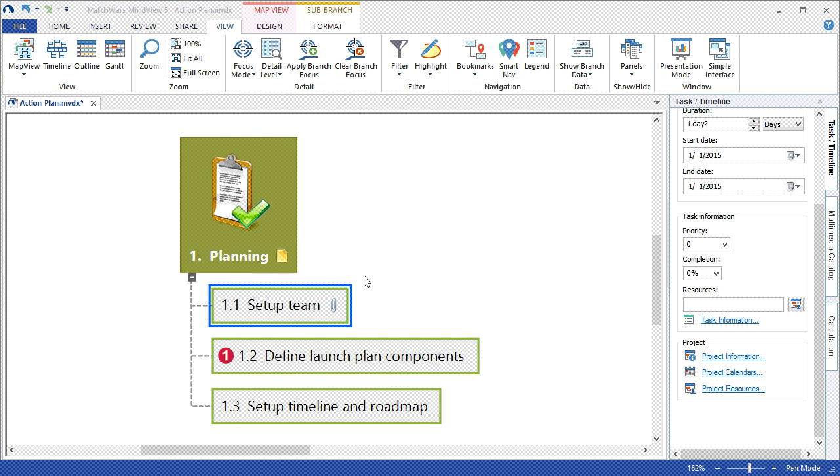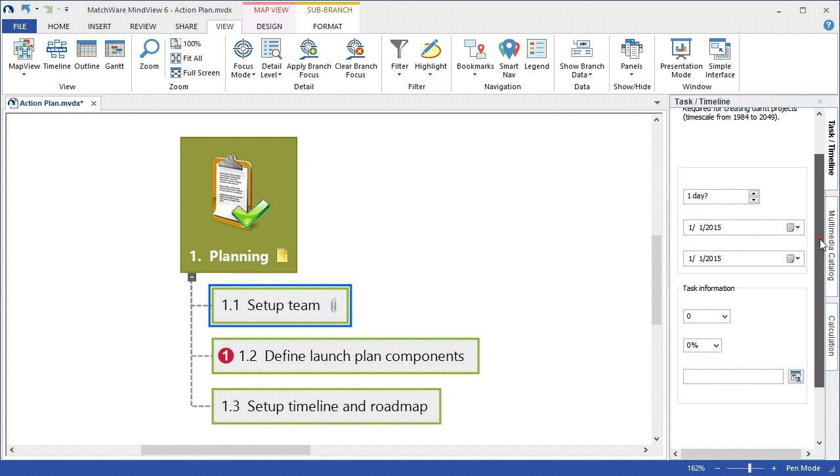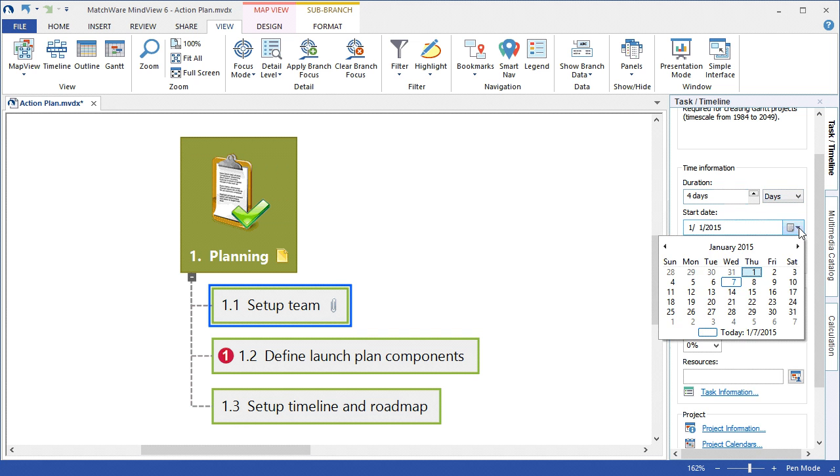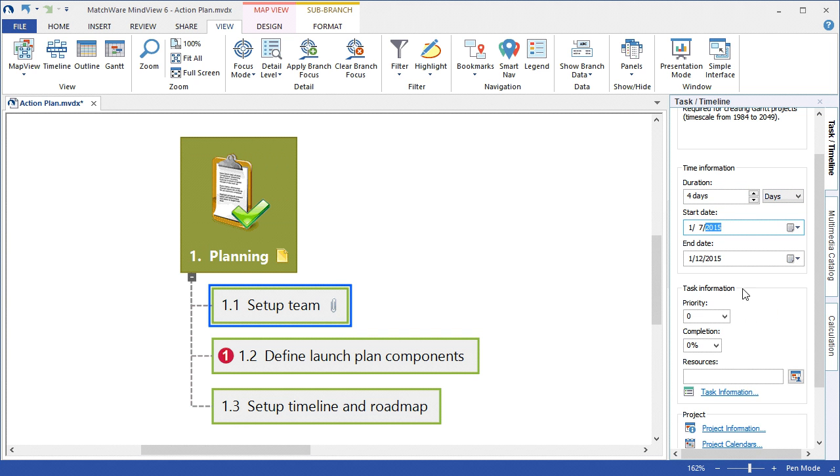Now that we've added the Project Information, Project Resources, and Project Calendar, we can begin scheduling the relevant tasks. I left-click the desired task, choose the duration and metric for that task, associate the start date. The end date is automatically populated based on the duration.